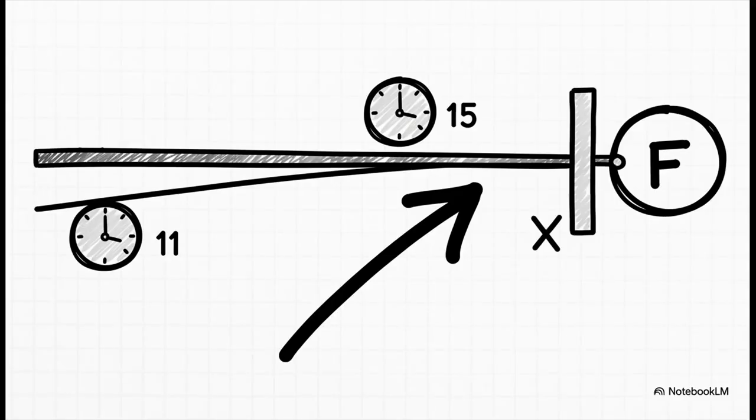Now this brings us to a super important rule you have to remember. Take a look at activity F. It needs both D and E to be finished before it can start. Well, D finishes on day 15, but E finishes on day 11. So, can F start on day 11? No way! It's still waiting around for D to be done. So you always have to take the highest number. The EST for F has to be 15.